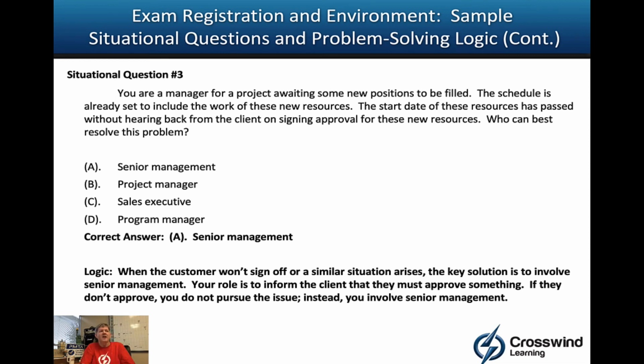So, here's the deal. Watch my hands, if you will. Here's your organization. Here's your customer. Now, if you're the PM, their point of contact over there, you're interacting together back and forth. If time goes on and they're not doing what they need to be doing and that's getting in your way, you don't go to their boss, but you go up to your boss or above you, senior management, and you let senior management go over and talk to the people on that side, and then they would help move things along, so to speak.